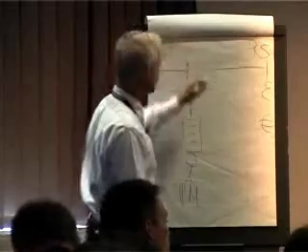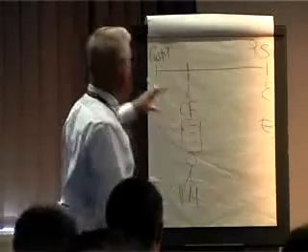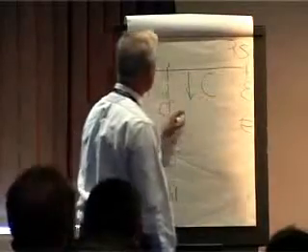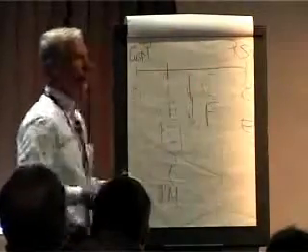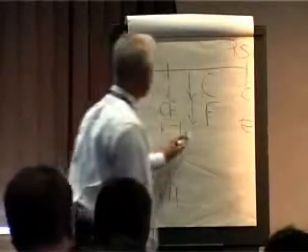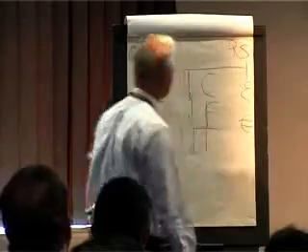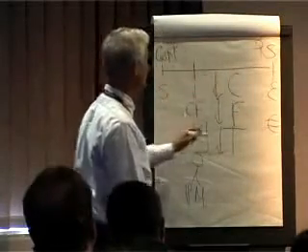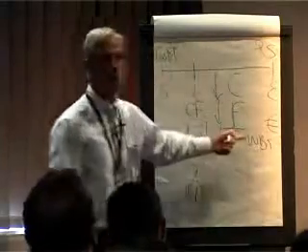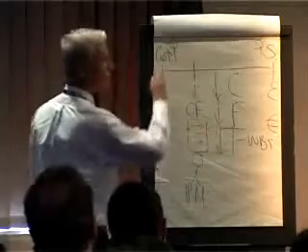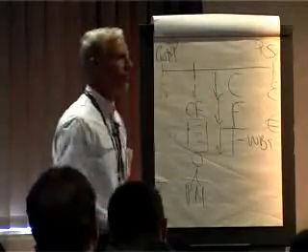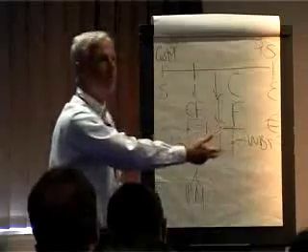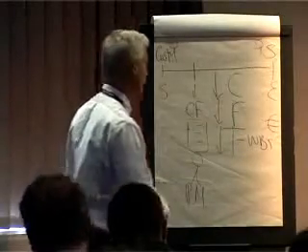So they start developing, and because the customer often has a lot of fear in the situation because they hand over control to this group, there's a reduction in control. There's a reduction in flexibility because they hand over control of the contract to this group. And there's also a reduction in transparency, for several reasons. First of all, there's a transformation of the work into a work breakdown structure, a set of tasks. So the customer language, like create a HSDPA protocol or support credit default swaps derivatives trading, is translated into a bunch of technical tasks and requirements documents and so forth.